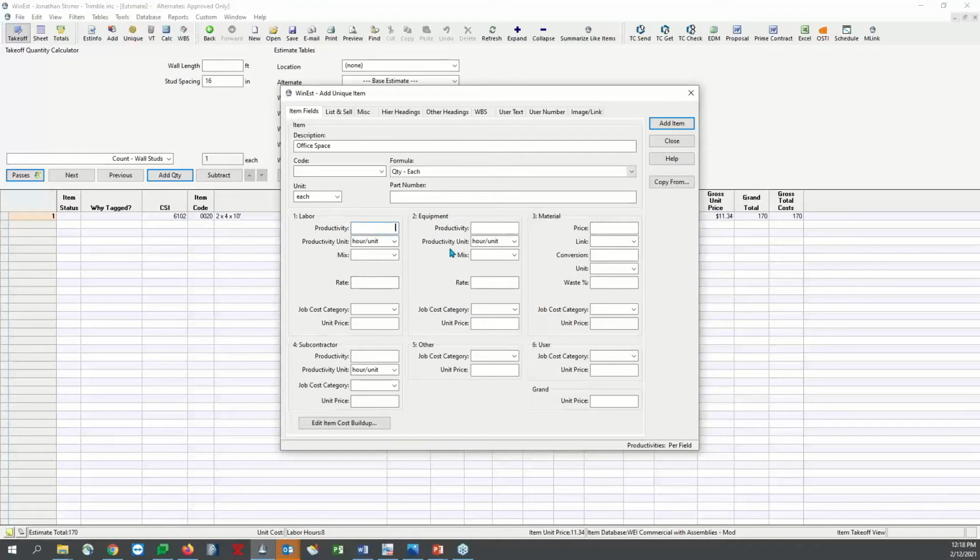We've got these different office spaces, and there's say 15 of those, and we do 0.25 of those in, let's see, hours per unit. We do a quarter of an office space in an hour. So in 4 hours, we're going to be able to get this knocked out.